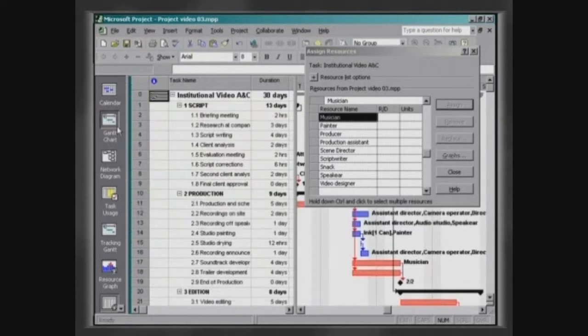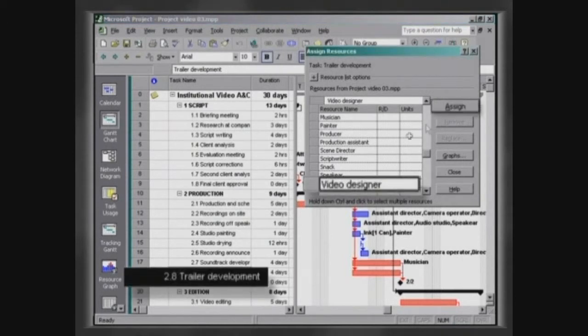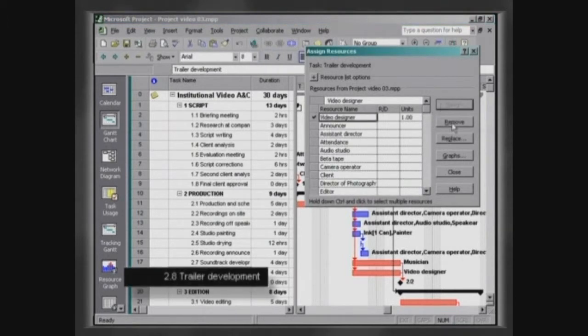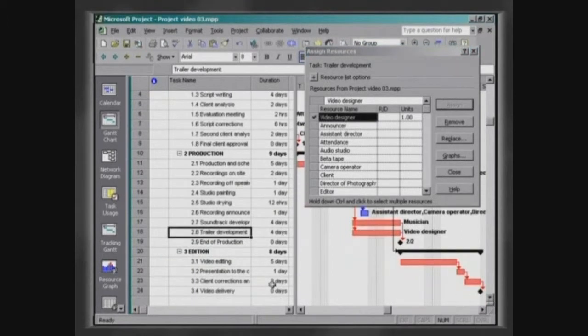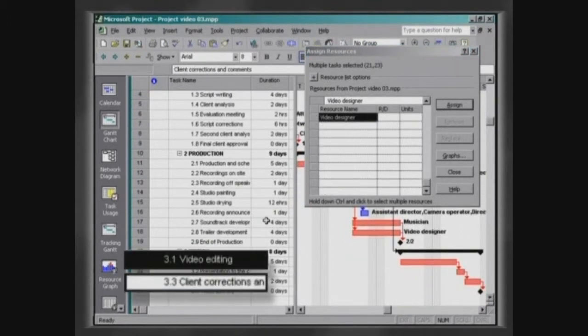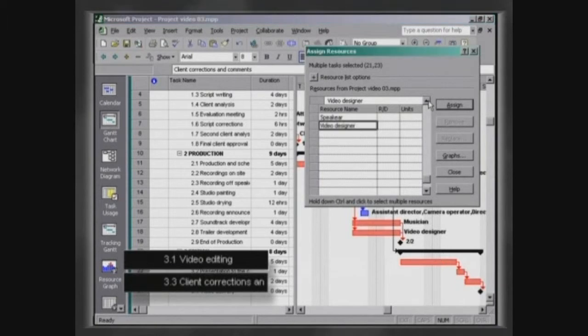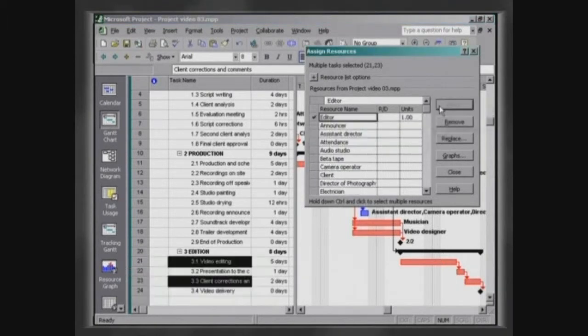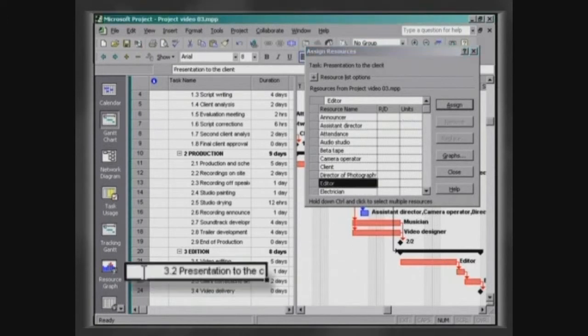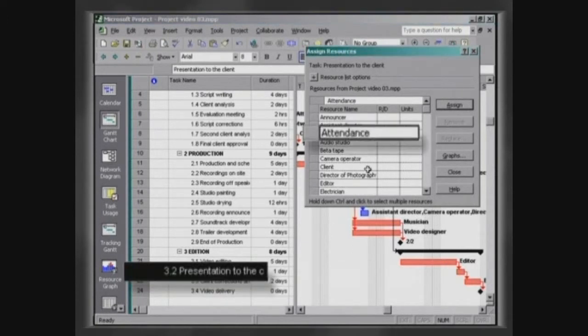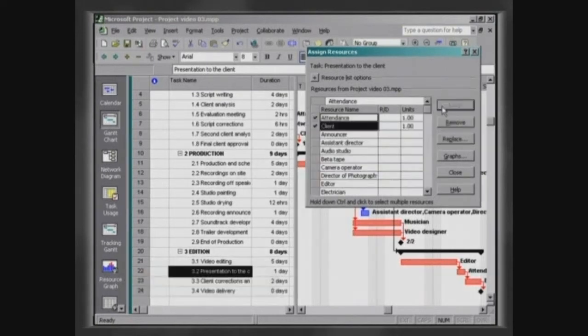Assign the resource video designer to the activity trailer development. Select the activities video editing and client corrections and comments and assign to them the resource editor. Assign to the activity presentation to the client, the resources attendance and client.